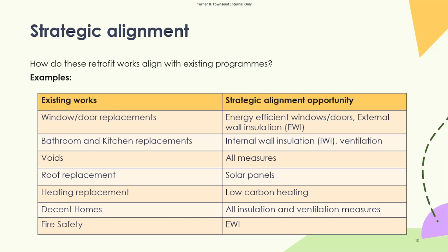Then there are things like roof replacements. So if you have any roof replacements coming up, a great opportunity again for you to carry out some solar panels because you're replacing the roof, you're putting the scaffolding, you're paying for it. Why not, whilst you're there, also install some solar panels?